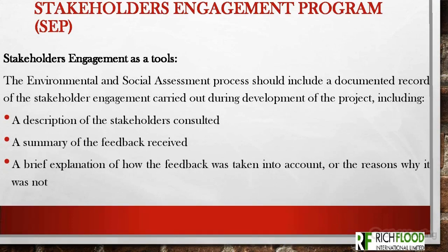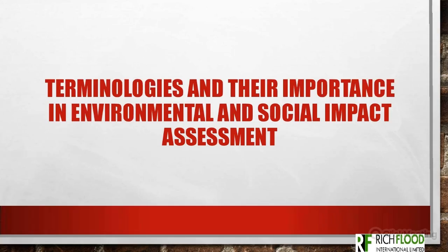Now, the documentation should include a description of the stakeholders consulted. Who are the categories of stakeholders that have been consulted? When were they consulted? Where were they consulted? What was the agenda of the meeting during the consultation? What was the feedback that was received during the consultation? So a summary of the feedback would be a part of this document and a brief explanation of how the feedback was taken into account or why it was not taken into account. All of this makes up a very good tool in environmental impact assessment.